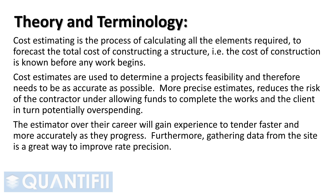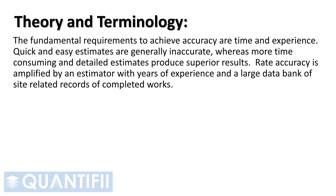Furthermore, gathering data from the site is a great way to improve rate precision. The fundamental requirements to achieve accuracy are time and experience. Quick and easy estimates are generally inaccurate, whereas more time-consuming and detailed estimates produce superior results. Rate accuracy is amplified by an estimator with years of experience and a large data bank of site-related records of completed works.